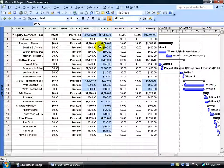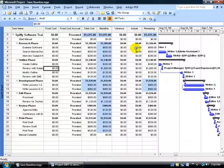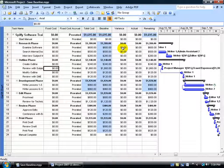So as we get in our actuals or as people start saying okay, you may have set aside so much money for this task here, we're actually saying it's $700. So $700 maybe it's more, it's $100 more so you have a variance column of the difference being $100. In any case, you get more details here and like I said, we're going to cover this in the level 2 training video.